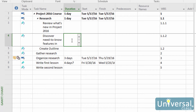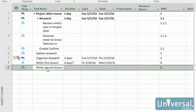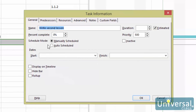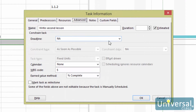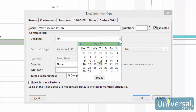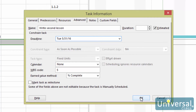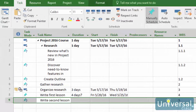To set a deadline date, double click a task to make the Task Information dialog box appear. Click on the Advanced tab. Click on the arrow in the deadline field — a calendar will appear. Select your deadline date by clicking on it. Click OK to exit out of the Task Information dialog box. A little downward arrow will appear on the deadline date in the Gantt chart area. To modify a deadline, follow those earlier steps and simply change the date.